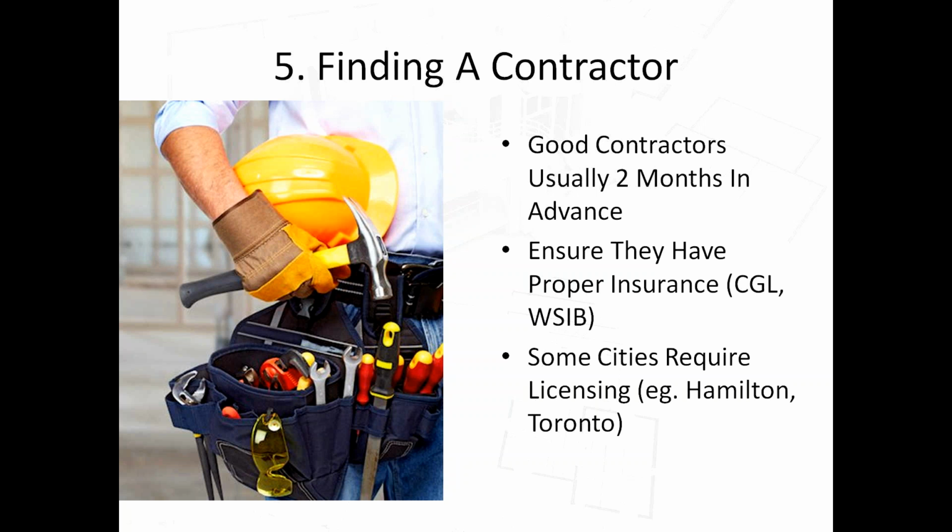And then some cities actually require additional licensing. So if you want to be a carpenter or a general handyman in the city of Toronto, you actually need to register. There's a licensing registration in the city of Toronto. It's usually several hundred dollars, and they have to do a test just so that the city feels comfortable that they know what they're doing. Hamilton does have that as well. So find out for that particular city where you are hiring a contractor whether they require that or not.